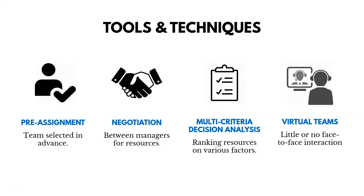Now let's talk about acquiring resources and the tools of that process. Resources could be pre-assigned, meaning team members are selected in advance with no real choice of who to involve. There's also negotiation, which is important in functional organizations where you may have to negotiate with functional managers to get the resources you need. Then there's multi-criteria decision analysis — ranking potential team members on various factors to determine who would be the best fit. And then virtual teams, which is another way to acquire a team — done virtually with little or no face-to-face interaction.